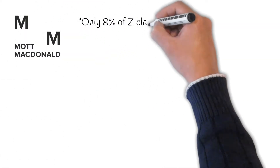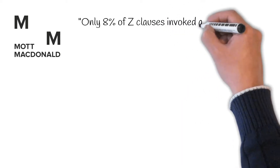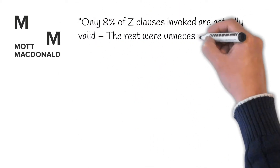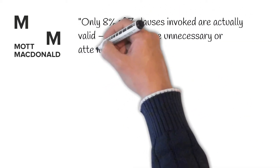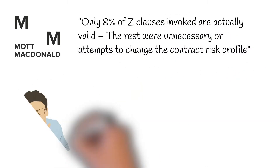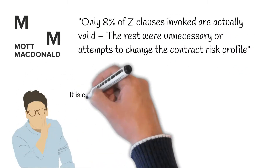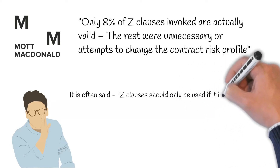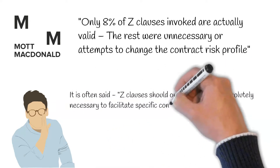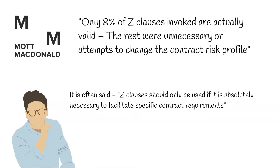Mott MacDonald's research found that only 8% of Z clauses invoked are actually valid. The rest are unnecessary or attempts to change the contract risk profile. It is often said the Z clause should only be used if it is absolutely necessary to facilitate specific contract requirements, and it seems the data supports this claim.